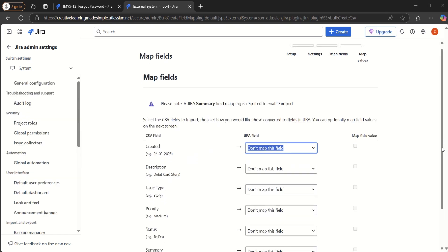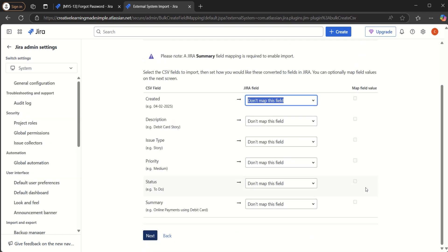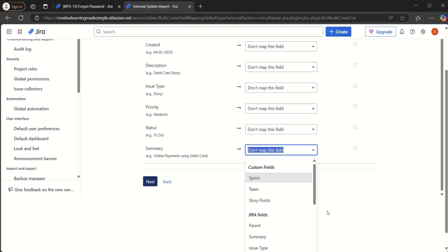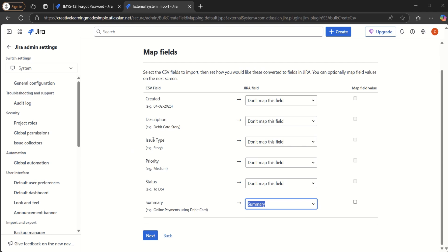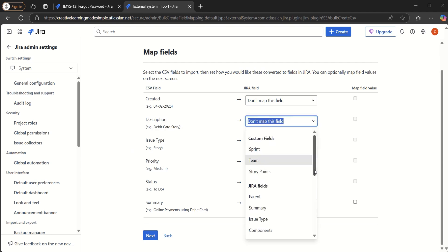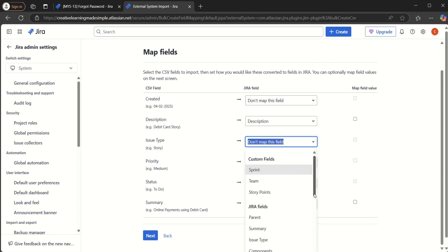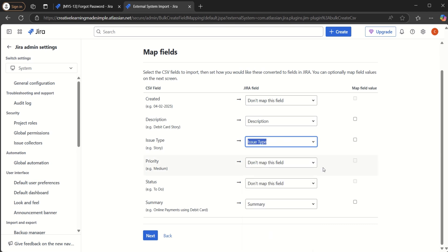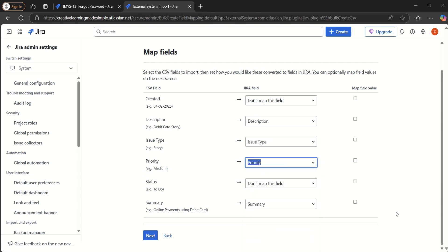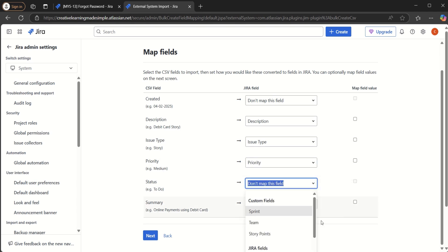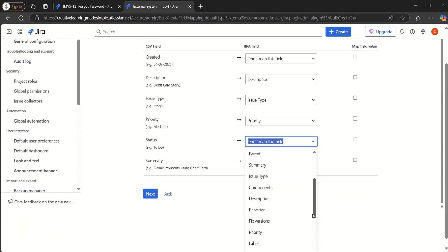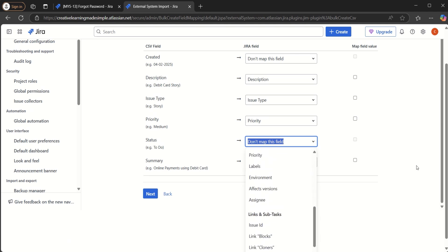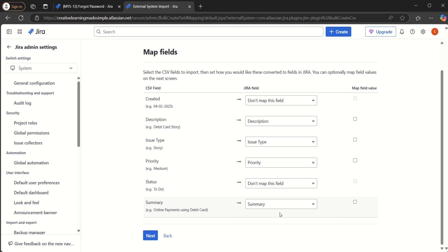Now here we can select some of the fields. It says that please note a Jira summary field mapping is required to enable import. So summary is this one. So we definitely have to select the summary. So summary is mapped to the Jira field description. We have issue type mapped with the issue type in Jira. We have priority mapped with the priority here. Let's see whether we have a status here. So if status is not selected here, so we will keep it as it is. And if I click on next,